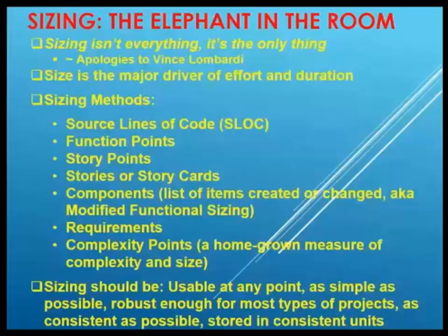Yes, we have. We've done some analysis on going from stories to what we call implementation units, and it's based on the type of project. The factor that my organization uses, and may or may not apply at all to anybody else, is 150 as a gearing factor for all other projects except for enterprise projects, and there we came up with 300.